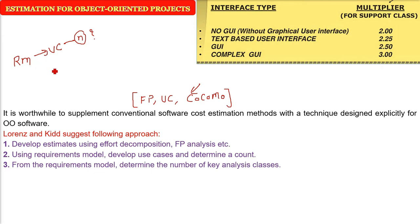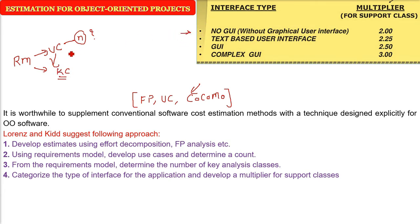From the requirement model and use cases, we determine the number of key analysis classes. There are key classes and supporting classes. You must categorize these key classes by interface type: no GUI (without graphical user interface), text-based user interface, GUI, or complex GUI.